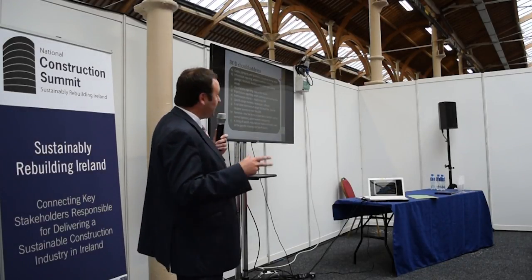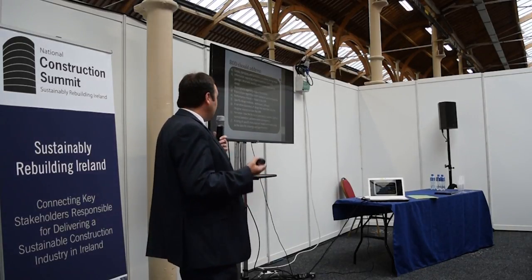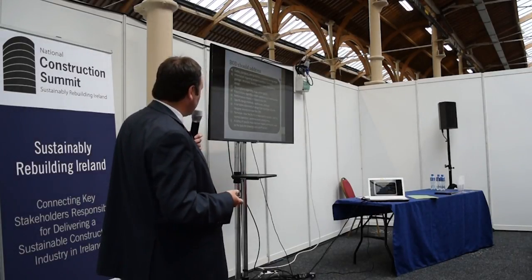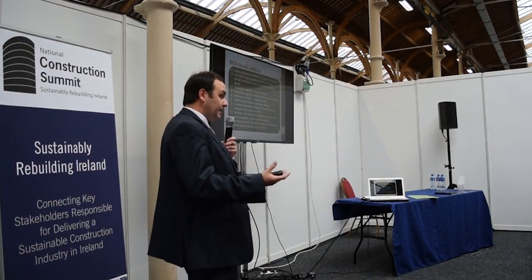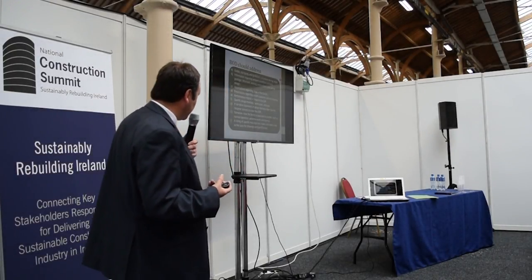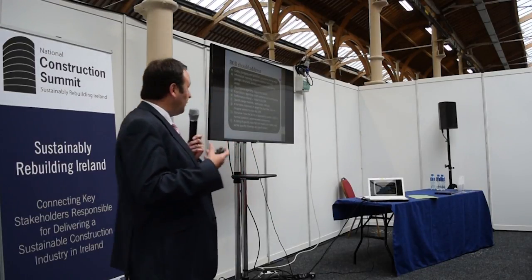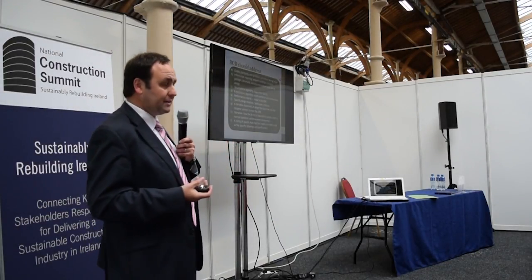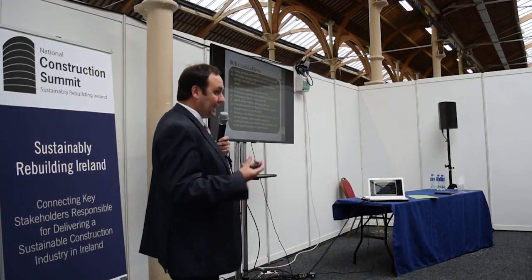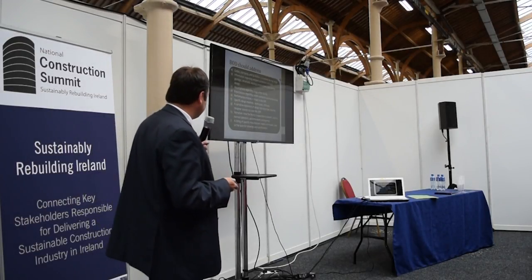And then the basis of design is not intended to be written for the design team. It really should just address variations and the codes they're specifically using, and assumptions that the design team perhaps would have interpreted from the owner's project requirements. This is an opportunity to clarify a lot of these, and they have a specific narrative. So the commissioning authority reviews this both with the owner and the design team, and the aim is that they will continue to enhance the project. As I said, these are two live documents that live through the whole process.